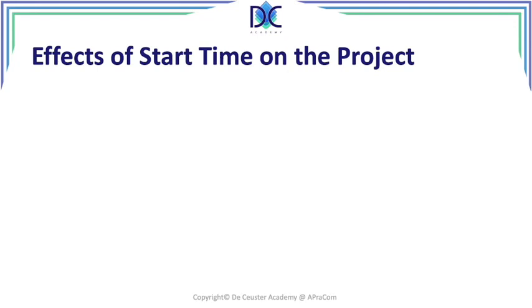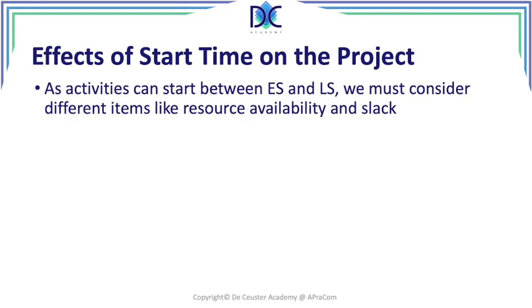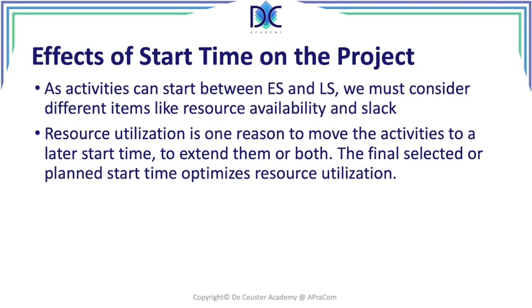Now, effects of start time on the project. We always have to look at finding a start date which is between early and late start. Late start is obtained when we calculate back, in our case, from the same end date of the project, the duration of the project, but we can also use the late start date as the time that the customer wants us to finish the project. And then we can look at resource availability and slack.